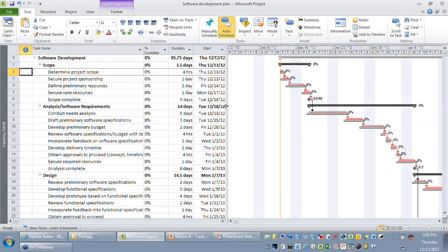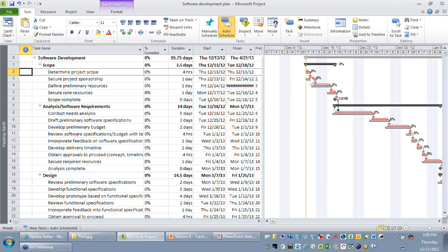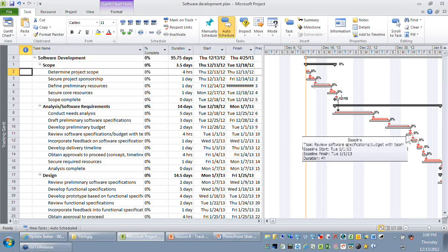Now you are able to see that for all these activities, there is a black color bar that is drawn below all these activities. The black color just represents these activities have been baselined, whereas the top bar ideally represents your current plan. You might also observe that all these activities are falling on your critical path, and that's the reason it has been marked in red color. So the first step is I'm making sure my view is in tracking Gantt, which you can see on your